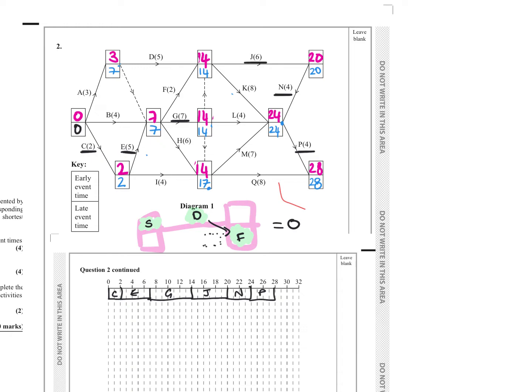And now we're going to learn to, what are we actually going to learn to do? Does anyone know? Say the alphabet. Okay, what does the first letter in the alphabet say? A. So we start at A. So we start at 0, has a duration of 3. Okay, we start at 0, duration 3, and then the last one is 7. So dot, dot, dot, A. After A, what do we have? B. Okay, starts at 0, it's 4 long.